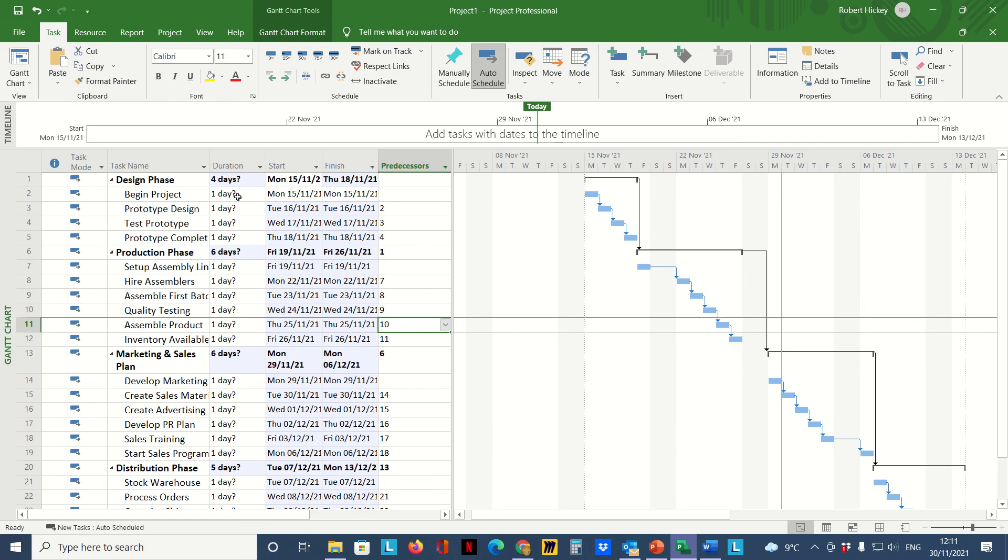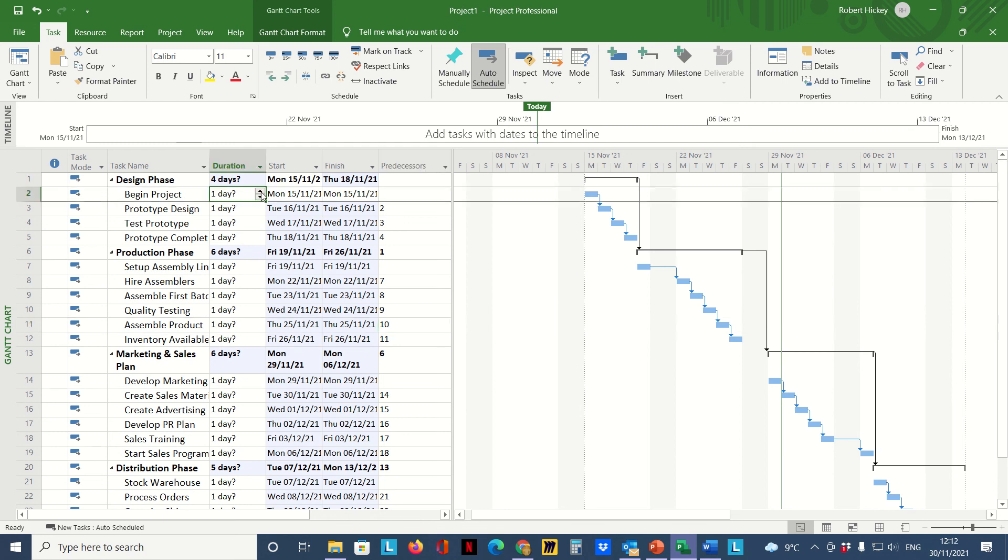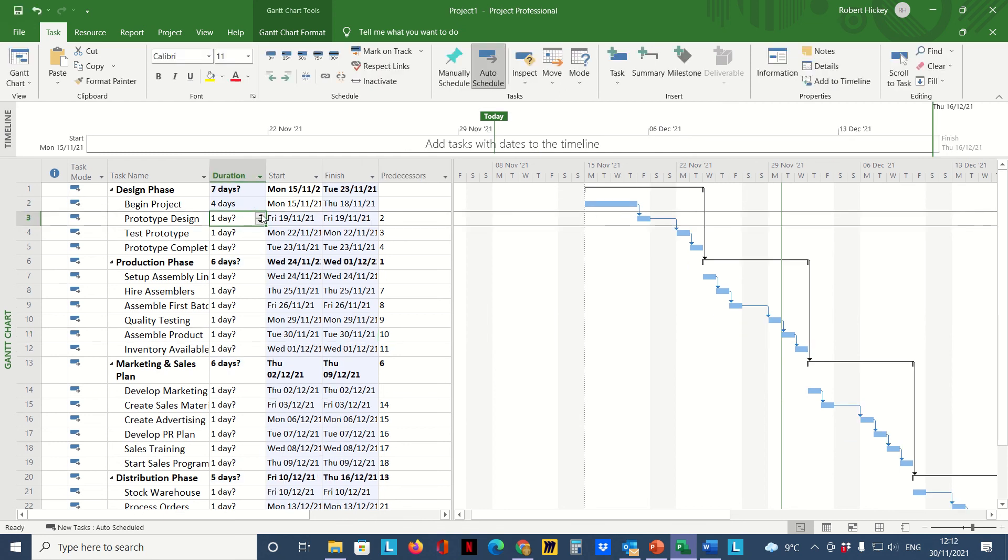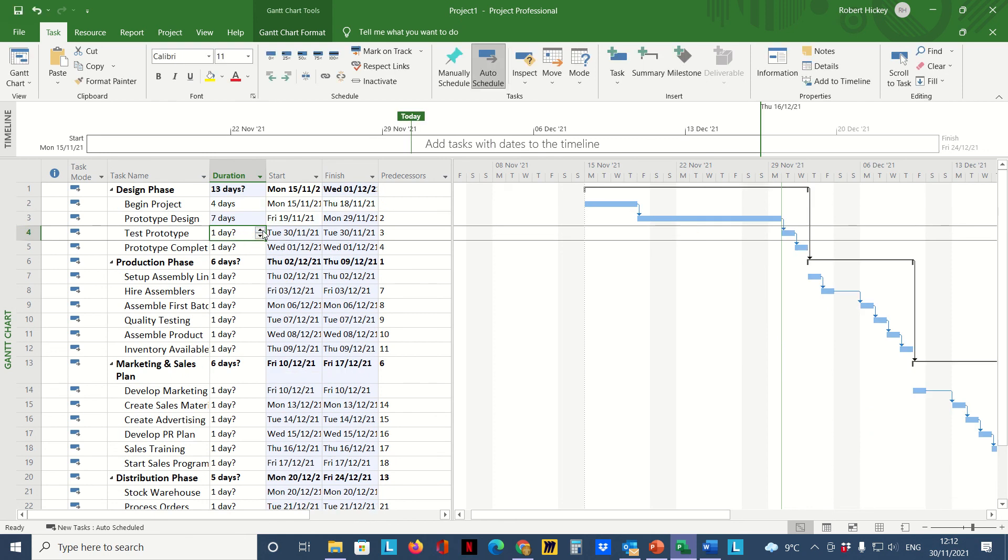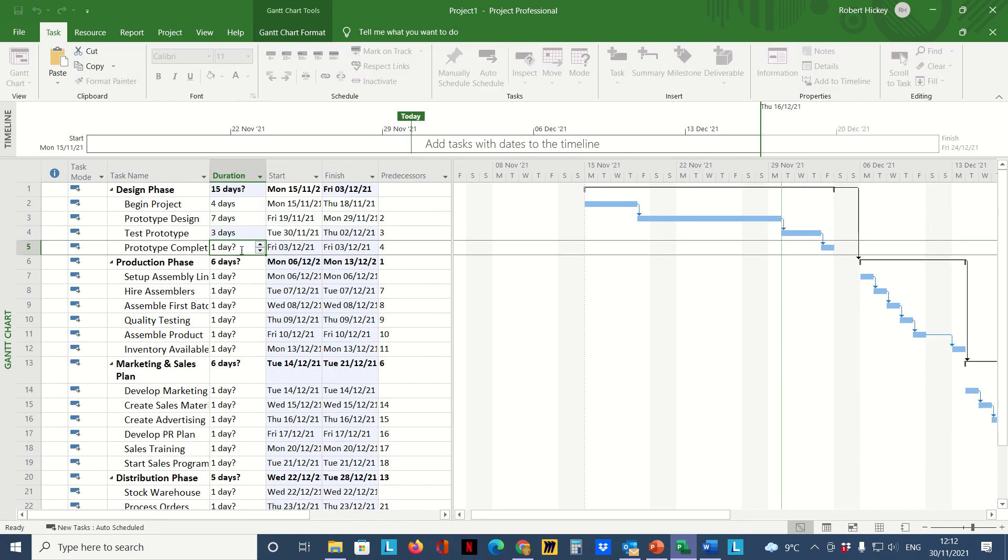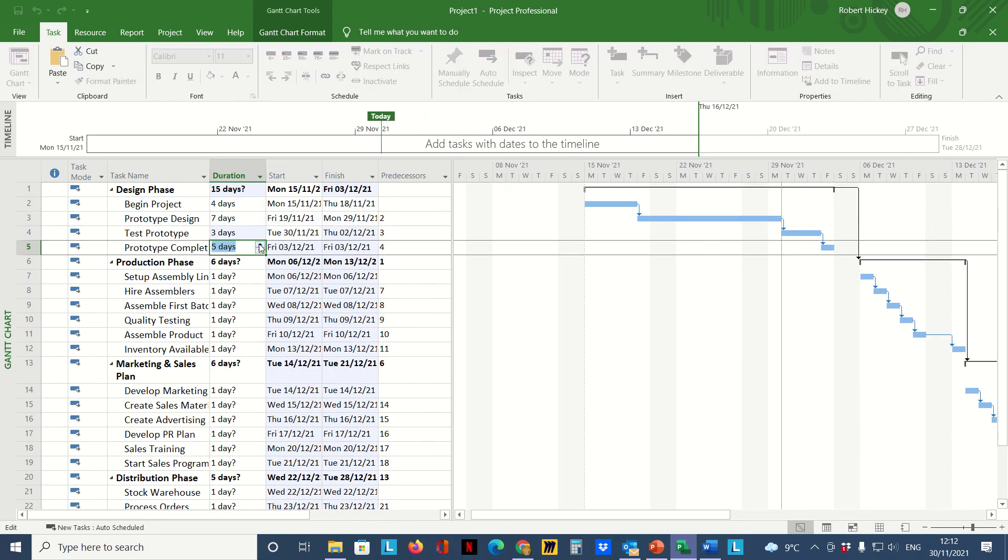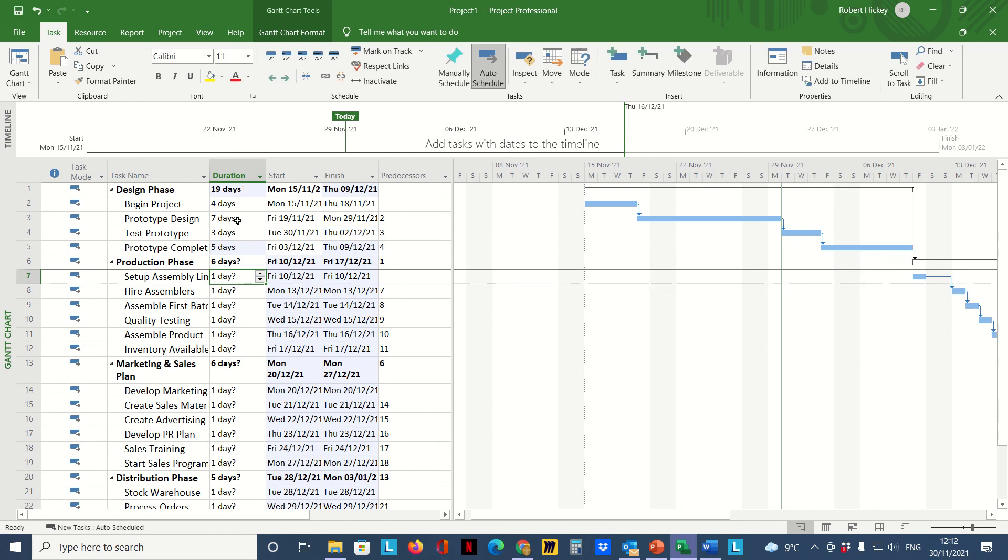At no stage will I type in a duration there. I will definitely type in durations now for these individual tasks. Let's go in and change some of these. As I start changing them, we can see that the summary task is totaling up. The summary task is totaling up, adding up all them.